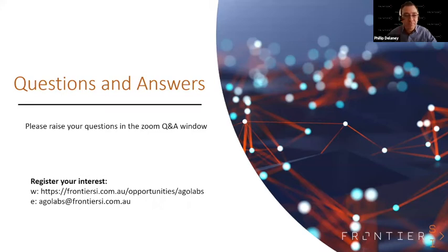Thanks, Phil. A question perhaps for you here, Phil, on invoicing, monthly or milestone. Yep. So the contracts are generally milestone based, pretty simply. Though I believe last time these are only 6-month projects, so we're not looking to overly complicate them. I believe we had a kickoff payment, something for around the midterm review, and then a final deliverable payment. So 3 milestones over the 3 to 6 month period.